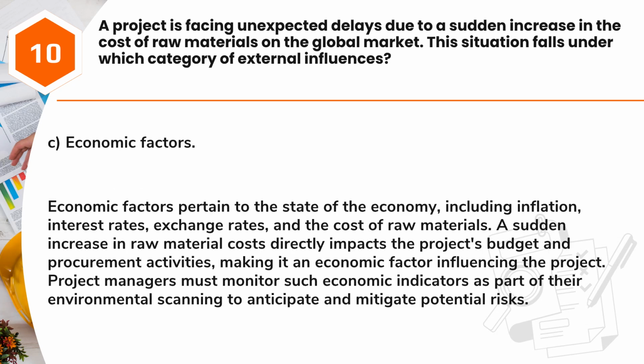Answer: C. Economic factors. Economic factors pertain to the state of the economy, including inflation, interest rates, exchange rates, and the cost of raw materials. A sudden increase in raw material costs directly impacts the project's budget and procurement activities, making it an economic factor influencing the project. Project managers must monitor such economic indicators as part of their environmental scanning to anticipate and mitigate potential risks.